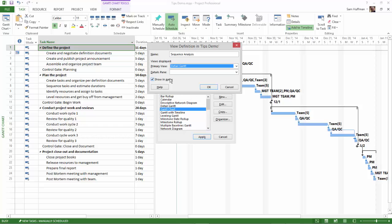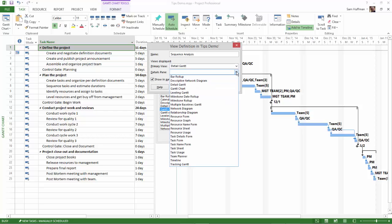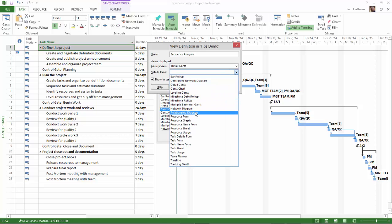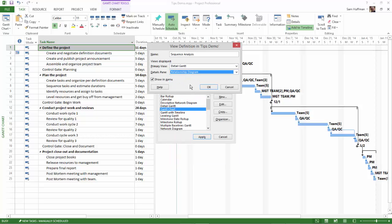The Details pane that I prefer is called the Relationship Diagram. The Relationship Diagram will show the immediate predecessor and the immediate successor for any task in your list.